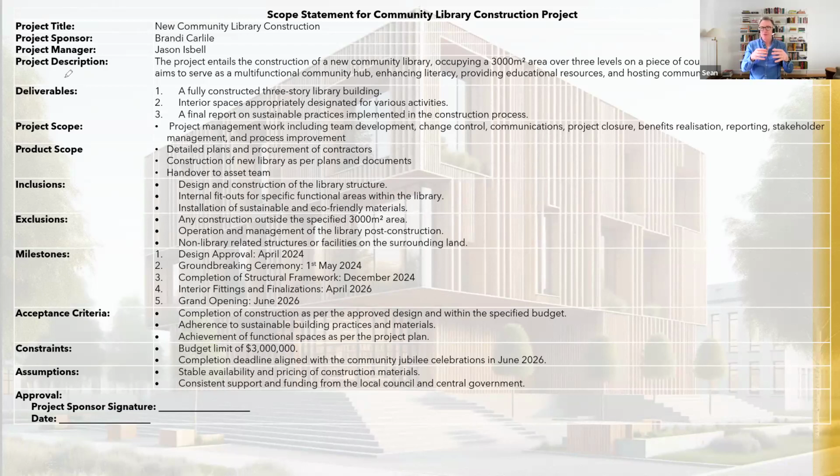And then I just remember the other project manager got a dismayed look on his face and looked at them both and said, guys, we're actually on version 5, and pulled out his printout. So in that, we had 3 different versions of processes with material differences between them. So immediately after that, we gathered all of the ProMap stuff and Visio process mapping, put it all into one folder, and locked it all down.